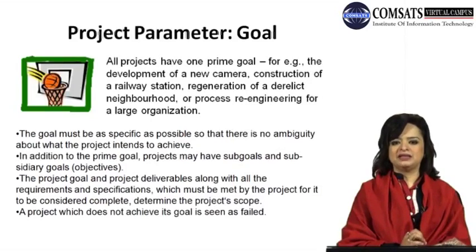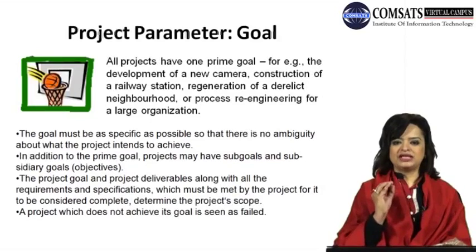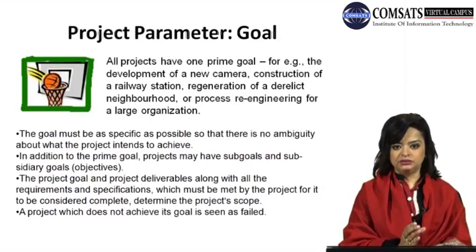There are always signs in between that can indicate to the sponsors and the project manager that this project is becoming a troubled project. It's the responsibility of the project manager to identify these as risks to the project. A risk which has happened and has occurred becomes an issue, and it needs to be tackled appropriately.